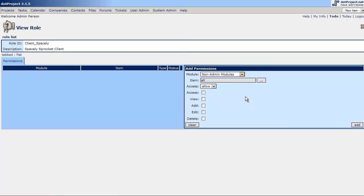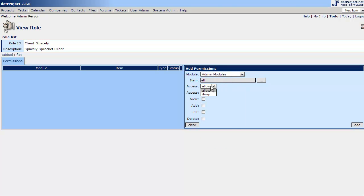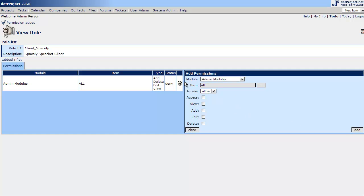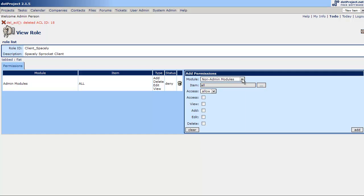Let's build some permissions for that. So when I want to give access to a client, this is the way I typically set one up. I deny access to the admin modules. So I deny, in whole, absolutely anything. This is more precautionary on my regard, I guess. Now, there is no access to the admin modules whatsoever. OK, so now we're going to select which non-admin modules we want the client to have access to. What we want them to be able to view is projects, tasks, calendar, and that's it. Nothing more, nothing less. And only for their company. So, this is where it gets a little funny. What we've got to do first is deny all non-admin modules.